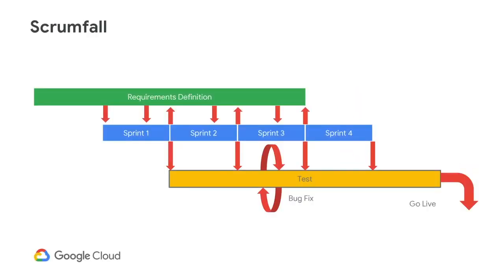Teams that move away from waterfall have a tendency to move into scrum fall. It breaks the work into sprints and starts testing cycles early on, so it helps the team pivot and provide early visibility to progress. However, because testing is separated as a post-sprint activity and not included during requirements definition and sprints, testing and bug fix time is elongated and long release cycles invariably happen.